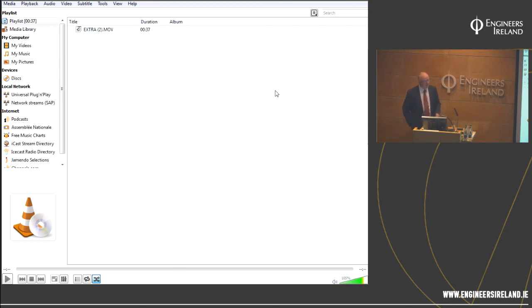So we went back to the authority and said, listen, lads, you're going to get 10 years if you're looking for an agreement cert on this. Good conservation practice would say we replace like with like, but there are no guarantees on that. And they said yes, okay, to that. And what we did in that situation, we had two trusses on the southern elevation, which we weren't going to use. They were going to be removed. So they actually got chopped up and the timber was reused within the building as timber lintels.